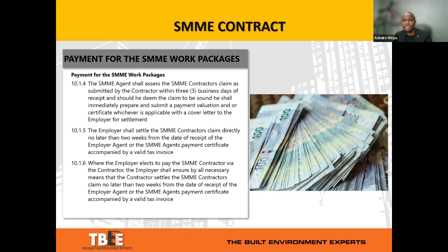But from a contractual point of view, the SMME contract is there to explain the payment process and the payment terms. Our recommendation is merely that, just a recommendation, and the finer details can be discussed with the client. So again, when it comes to payment, the role is primarily that of the SMME agent to assess the SMME contractor's claim. It relieves the quantity surveyor and the principal agent from being involved at that level of assessing those claims, and it also indicates how those claims are then settled by the employer.